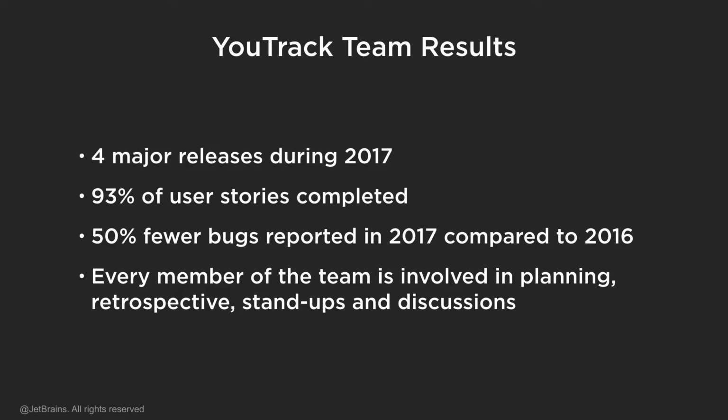We do try to limit the number of these support requests, and we add only really important ones. Actually, we have two swim lanes for support requests. I just wanted to tell you about the top one, but we also have the bottom one for those requests that can wait for a while, that are not urgent. So we can mix and match. We can look at the problem, and if it's not really urgent, we can just move it to the bottom of the sprint or of the board.